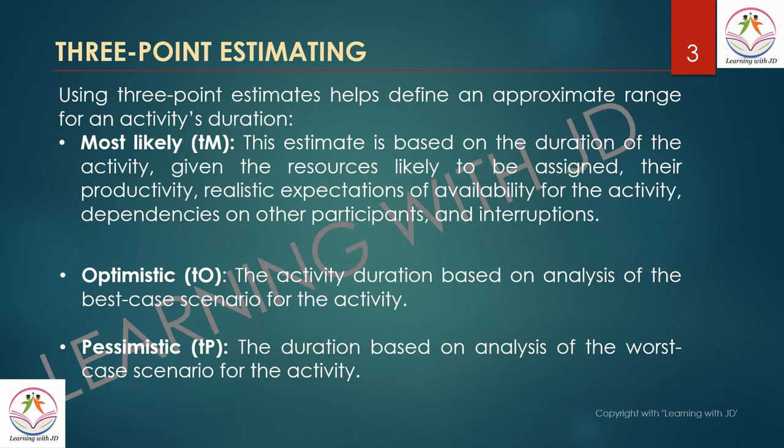Now comes three-point estimation. Using three-point estimation helps define an approximate range for an activity's duration. You will definitely get one or two mark questions on this — it's a simple calculation. There are three parameters: the most likely, the optimistic figure, and the pessimistic figure. For example, in the most optimistic scenario you finish the activity in 5 days, the most pessimistic scenario is 15 days, and most likely is 12 days.